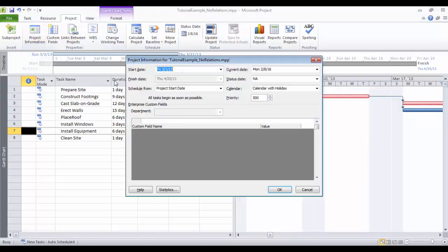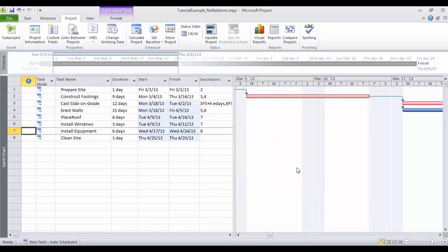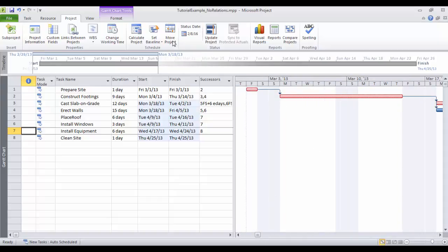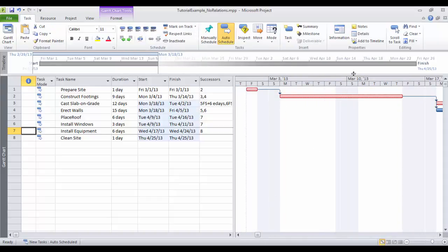So if you go back to the project information, now I extended the project by 1 day from April 24th to April 25th because of this holiday. So we're almost done with the basic scheduling part, which is part 1 of this series. The last thing I want to show you is sorting and grouping activities, meaning make it simple to track activities and know which parts of the project they refer to.